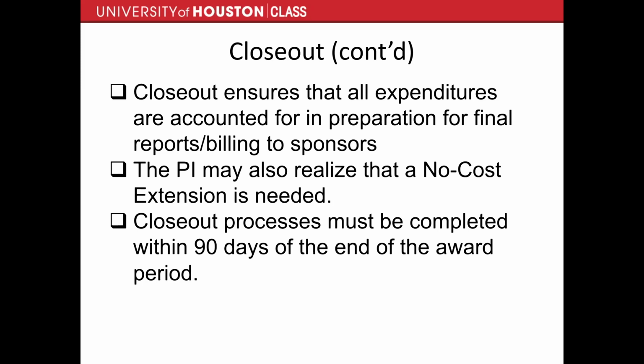Now, once it gets to the second request, it gets a little squirrely. There have been some instances where they've allowed it. Most of the time, they didn't. Again, you'd have to have a really good justification for that. A third time, in my experience, it's unheard of. So just be mindful of that as you're planning throughout your project, and anticipating how much time you'll actually need and things like that.